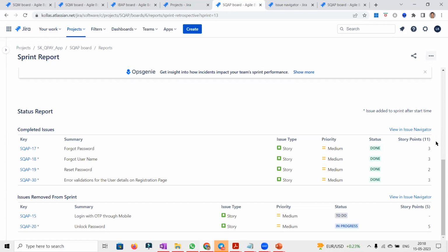And that is the reason we consider the average velocity of the last 3 to 5 sprints. Right? We are not considering only one sprint as a velocity. The typical velocity is the latest 3 to 5 sprints, either 3 or 4 or 5. As a team, we need to agree. And if they complete it in sprint 2 instead of sprint 1, it is still considered. And only when it is done are we considering it, maintaining the transparency and showcasing the true working or valuable software.